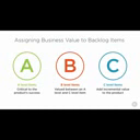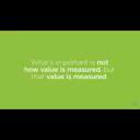In the end, what's important is not how value is measured, but rather that the team is measuring it in some way that can facilitate a discussion about whether or not the team is always working on the highest value work available. And lastly, I'd like to point out that the ordering of the product backlog is very intentional. Product backlogs are ordered by priority with the highest priority items at the top.